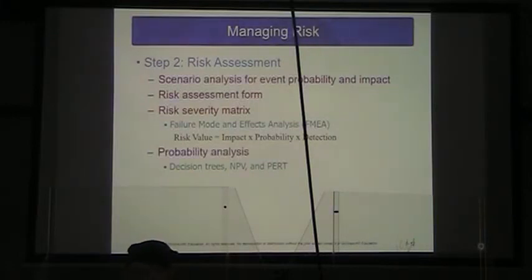An idea that has become popular in recent years is the failure mode and effects analysis, FMEA, if you will. That's where we give every risk a value based on its impact times its probability times its detection.